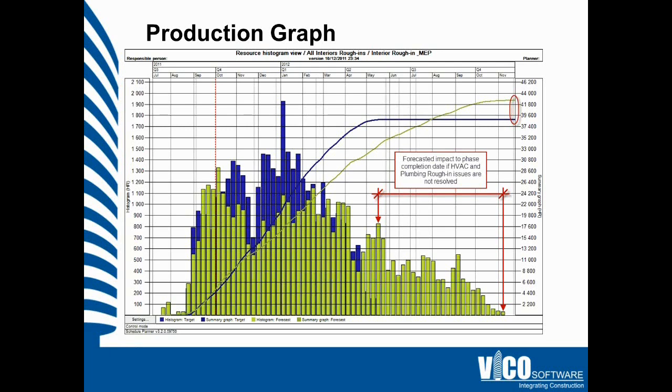If you look in the upper right-hand corner, it is projecting a difference of required man hours to install this work of several thousand, which is probably something that is good to know about early and try to mitigate, because not only do those increased man hours result in increased cost for someone, they're also likely going to take longer to complete, which means potential delays to the completion of your project.